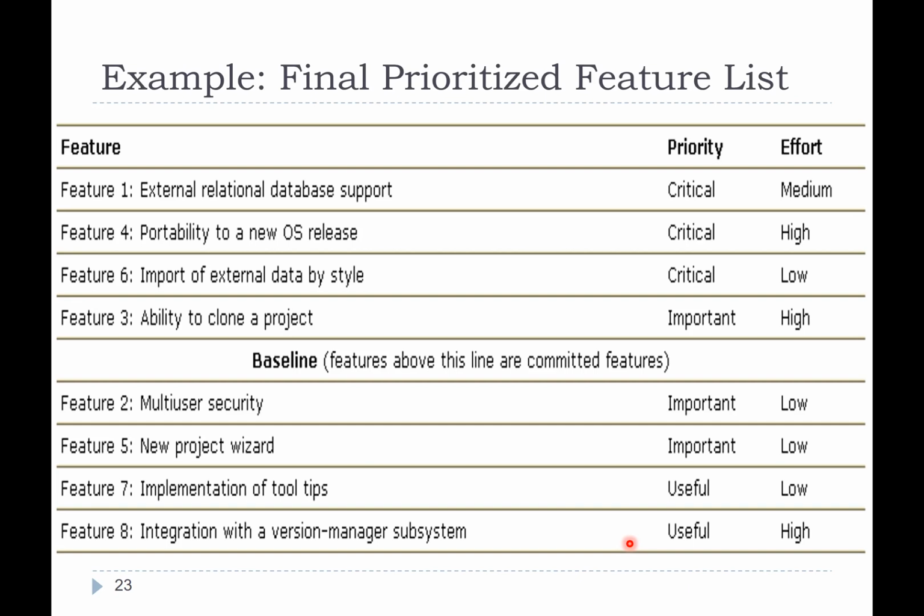One thing I mentioned a few moments ago is requirements leakage. Now, imagine if you have this list over here, and then, because you don't have a proper working place, maybe let's even call it corrupt, the customer phones in two weeks into the project, and they say, can you squeeze in feature number 11 in the top part, please? And then you start to say, yeah, okay, fine, I'll do it for you. This is called scope leakage.